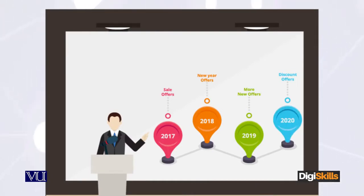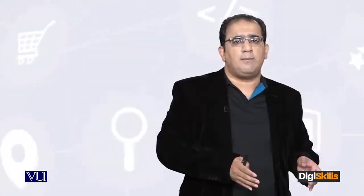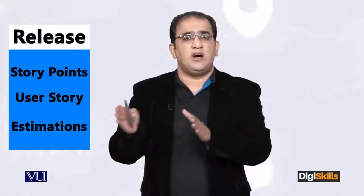We track which component of the release is possible and which is not — we cannot say that a release has 8 components and we can deliver it in 2 months. That is not possible. So this has also been estimated after story points, user stories, and estimations. After that, the deadline is created. The objective here is to show you that over a roadmap, multiple releases are created over the period of time by the engineering team.